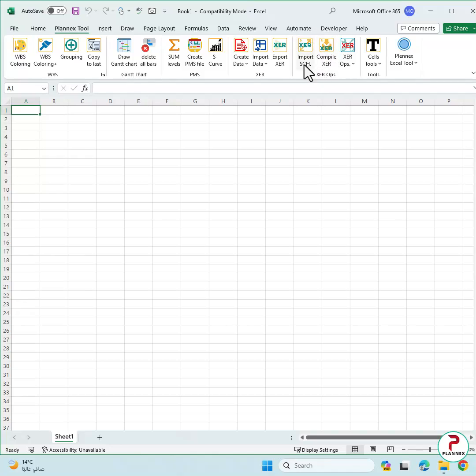So this section you have to be professional to use it and to know what you're doing inside the XER file. This one will help you to first fix the duration fractions, and I advise to use this only when you're finalizing the baseline, not for the update, because if you use it for the update, it could disrupt all the file information and how you're updating the file, especially if you're using duration percentage.